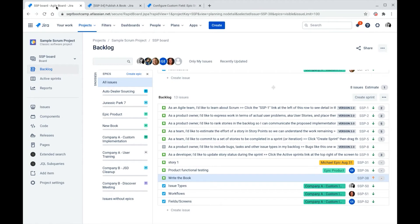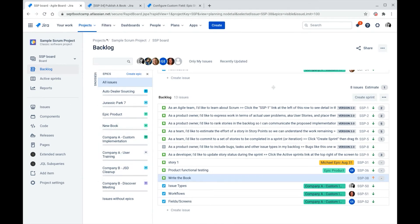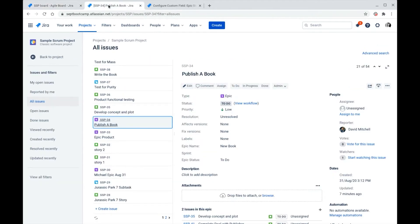Let's jump over to a project and look at what happens with this field. We have a project with a number of epics in them. We're going to focus on an epic called New Book. So when an epic is first created, it defaults to the to-do status. For the rest of its workflow, even when an epic is closed, this field will not change unless it is updated manually or through some type of automation.